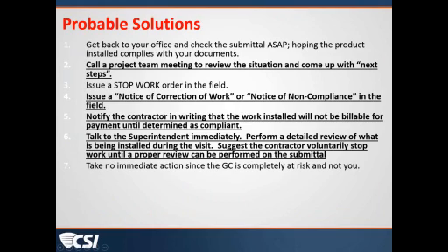Well, that's a great point. In this case, as our example, the following occurred, and I think Larry made a great point there to go back to the general conditions and the requirements that say you're not supposed to be working out there without an approved or reviewed submittal on the job site. So in this case, what happened, the team meeting was called as quickly as possible to talk about